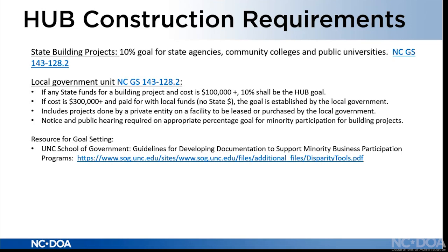So if the cost is $300,000 or more and it's paid for with local funds, but no state money, then the goal is established by the local government. And that includes projects done by a private entity on a facility to be leased or purchased by a local government.